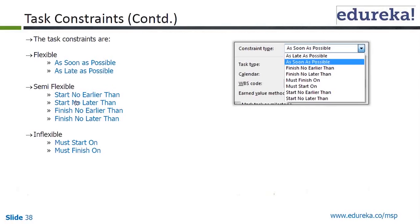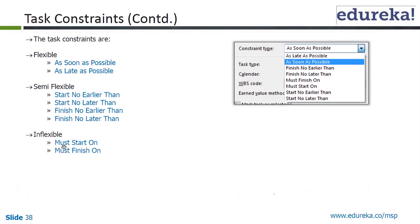Semi-flexible constraints include Start No Earlier Than, Start No Later Than, and Finish No Earlier Than. You have some date assigned, but there is some buffer before you do that. The last two are inflexible: Must Start On and Must Finish On. These are the categories of task constraints.